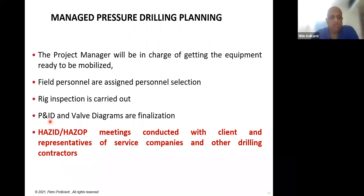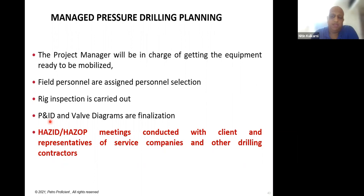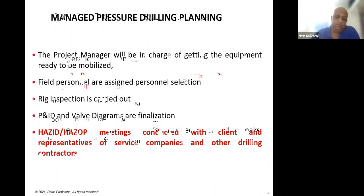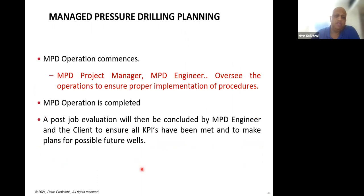Once all of this is done, a hazard meeting is carried out with the client, service companies, and drilling contractor. You explain the different risks involved because you are changing the drilling process by introducing additional equipment. Many things change when you bring in MPD, so the hazards must be analyzed along with the control barriers put in place.